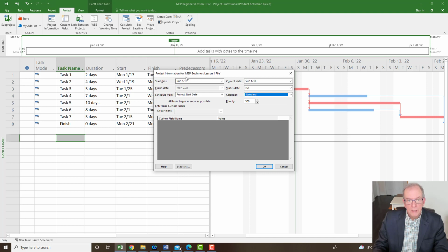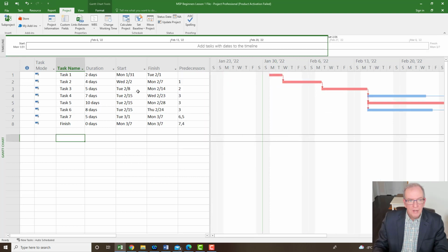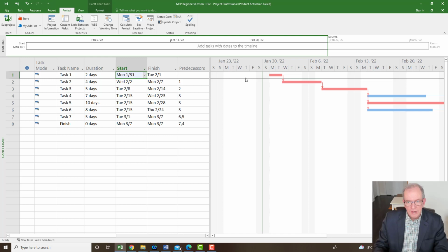We are starting, in this case, with a start date of today's date, Sunday, the 1st of January 16th. All right, you could always pull this down and say, hey, I don't want to start January 16th. I want to start the end of January. All right, so I can do that. So I start the end of January. I'll click OK, and everything moves to that period. So I've got that starting now, and everything is following the standard calendar, but I want to customize it.